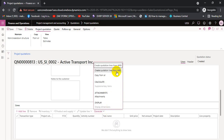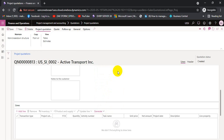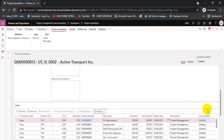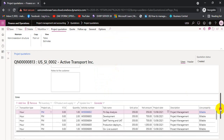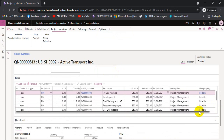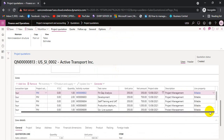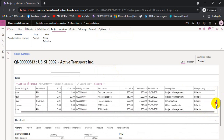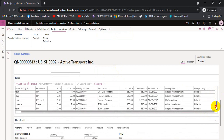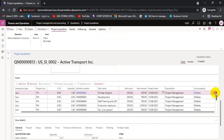After creating the WBS, we can click the Generate button and select 'Create Quotation Line from WBS.' The system will pick up all the WBS lines we have created and generate a quotation for us — and we can see the quotation lines are now there.